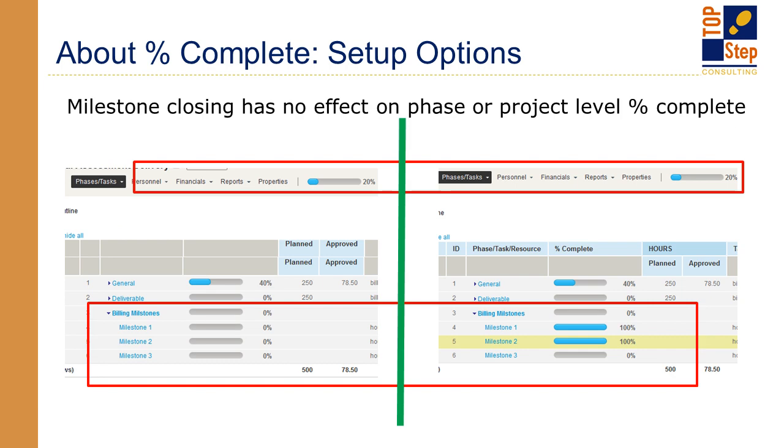So again, digging into an example, it's a little bit fuzzy, but digging into this example, in terms of milestones, how we discuss the percent complete on these being set to 100% upon closure, because there are no planned hours and subsequently 0 approved hours on the examples there on the left and right, we don't have rogue numbers being calculated into the overall percent complete